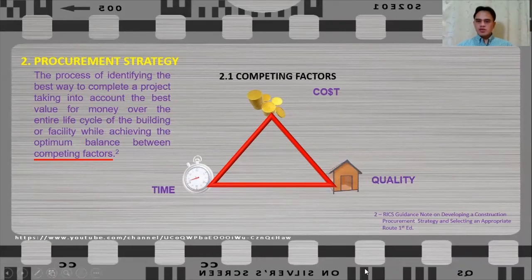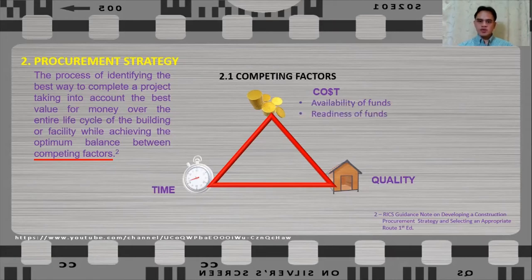When we analyze the factors that will affect cost, we don't only take a look at the total cost of the project, but we have also to take a look at whether the funds are available or when will the funds be available. Does the capital cost strike a balance with an operational cost or will the capital cost be the primary factor to the organization? So these are only a few things that we have to consider when we analyze the cost as a competing factor.